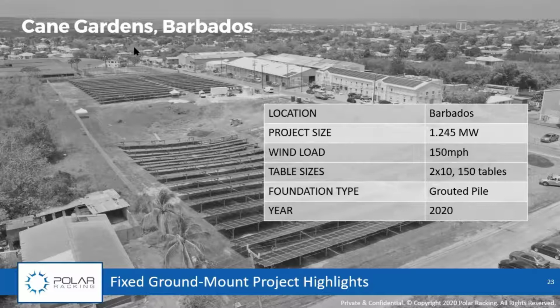So you're going to site with a lot of information up front in terms of how it's going to roll out, as opposed to just saying, I'm going to go with a grouted pile, I'm going to show up on site, and you figure out what bones are buried in the ground while you're there. It usually ends up costing you a lot more time and money doing it that way. So I highly recommend a very solid pre-production test plan before you start building on these sites.